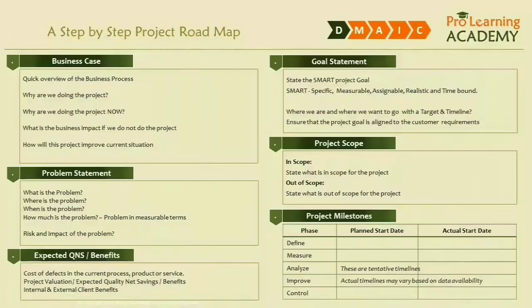Now let's move on to the problem statement. The problem statement should always cover what the problem is, where the problem is, when the problem occurs, how much the problem is, and the impact of the problem. Now once you've identified and defined the problem, you should be able to set the goal.